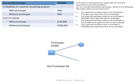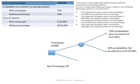If I do prototype, the table tells me there's a 70% probability the real product will pass acceptance testing, with rework costs of $0. If there's a 70% probability the real product will pass, there must be a 30% probability the real product would fail acceptance testing. The table tells us the cost to rework would be $20,000.